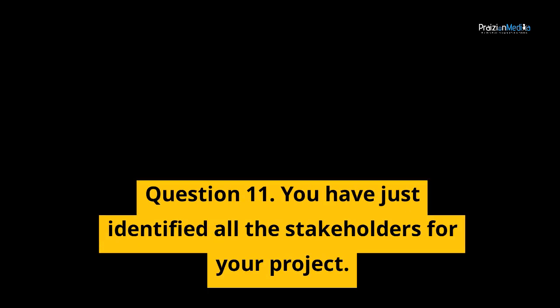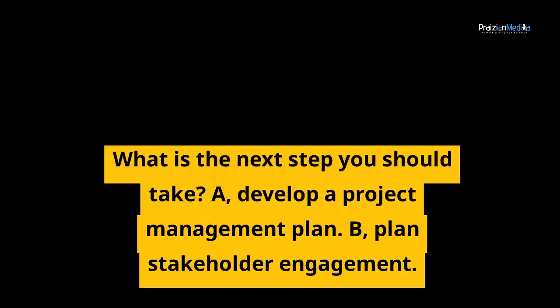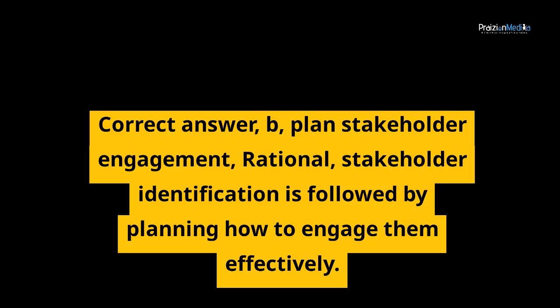Question 11. You have just identified all the stakeholders for your project. What is the next step you should take? A. Develop a project management plan. B. Plan stakeholder engagement. C. Create a project charter. Correct answer, B. Plan stakeholder engagement. Rationale. Stakeholder identification is followed by planning how to engage them effectively.